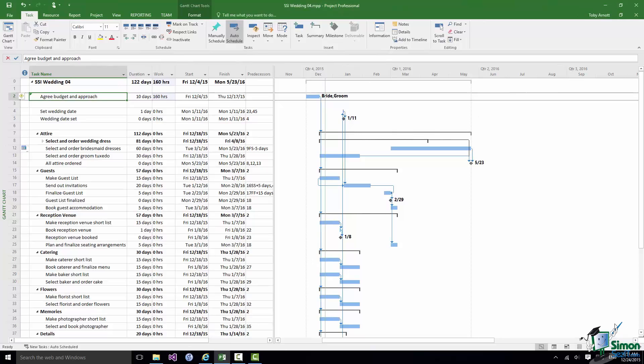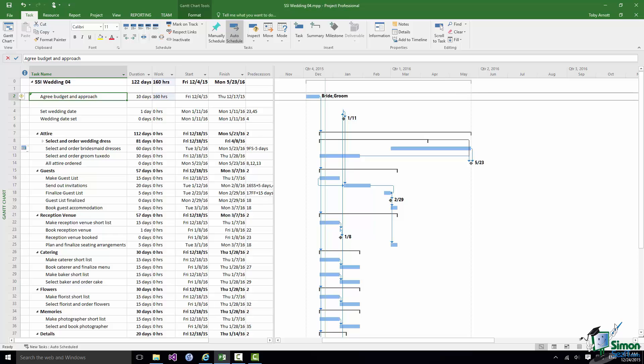One of the consequences of assigning the bride and groom to that task is to do with the amount of work involved in that task. I pointed out to you much earlier on in the course that when you look at work particularly for a new project and particularly when this project was new in the Work column there was zero hours of work because we had no resources assigned to that task. As far as Project 2016 is concerned we have now taken a ten day task and it defaults to an eight hour working day. So ten days for eight hours a day is 80 hours. And when I assign two people to it full time that is 160 hours of work. So as far as Project 2016 is concerned these two resources are going to do 160 hours of work on this task.